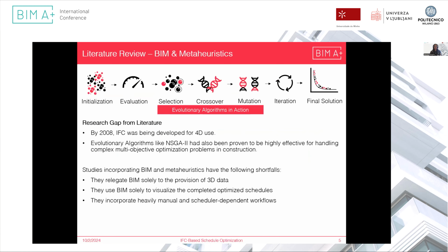Now, what makes an evolutionary algorithm special or better than the other ones is that it works with a large search area, larger than the other methods used. It initializes a set of populations. In our case, each individual in the population will denote an entire schedule from start to finish. Each of the individuals in these populations is then evaluated using a fitness function or objective function to see whether they are up to par.